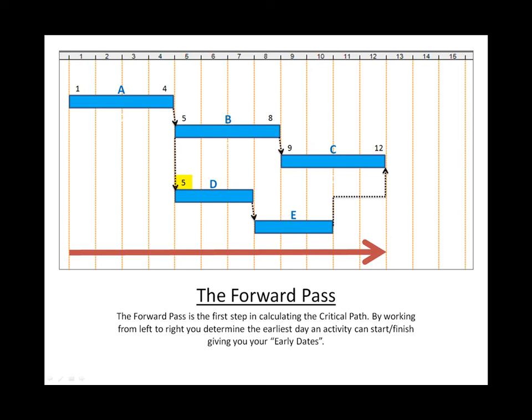You'll maybe notice that we have a start to start relationship between B and D, so that means that D can't start any earlier than B's early start, which is day five. The early finish for D would be day seven.